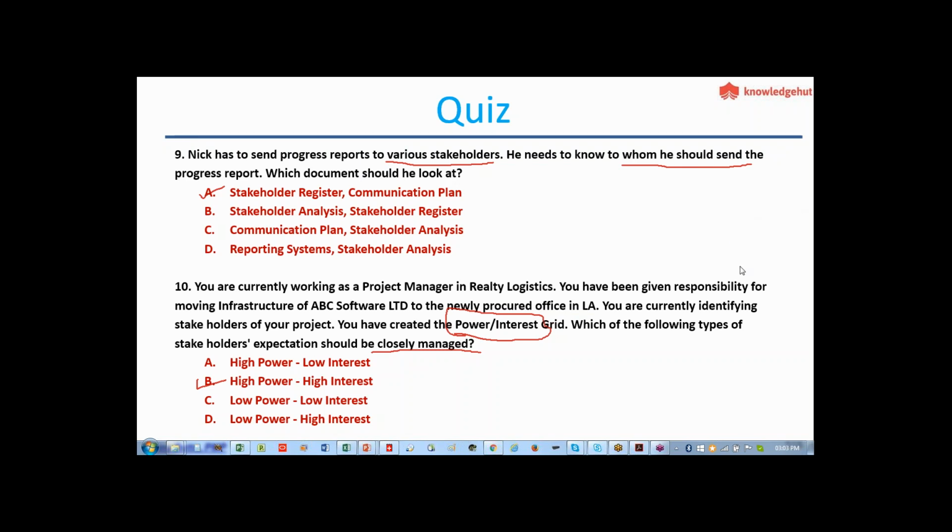So make sure that if you're working on a large project with many stakeholders, none of the stakeholders are missed, starting from the beginning, from the requirement. You should always make user acceptance test criteria. That is an expectation list, because the test criteria say very clearly what tests the product should pass so that it can be accepted by the user as correct. You can create UAT milestone-wise. For each milestone, you should have a UAT, and all these UATs will add up to the final UAT for the product. For the product, you can have certain different features which will be tested after integration.